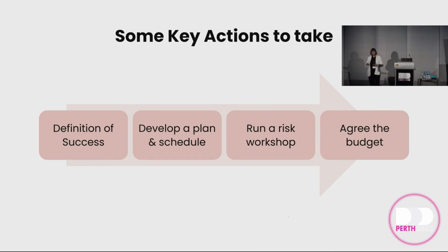And bear in mind, I'm taking this from the perspective of a project manager, but even as a team member on the team, you can help identify those risks and help to work to mitigate those risks and to take ownership of some of those risks. So it's not just the project manager. And the project manager cannot own the risks. They must be owned by someone who could do something about it. So I've seen project risk schedules this big, and the owner of all of them is the project manager. Still won't work.